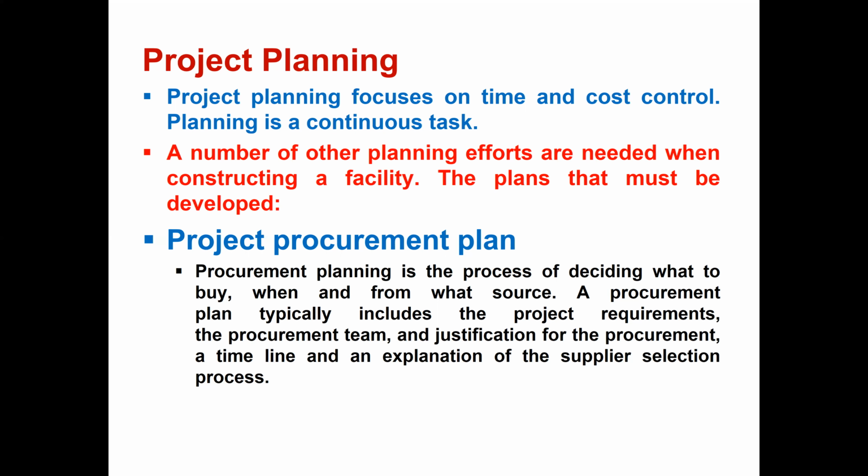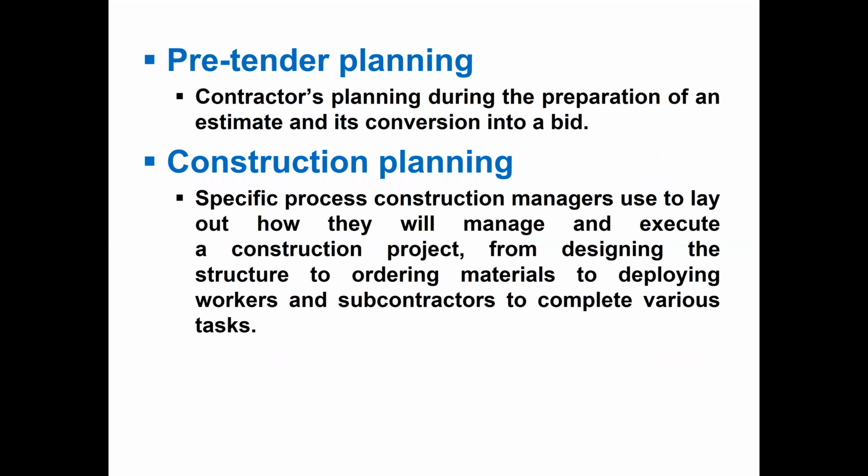All these, we have to make arrangements from where to buy those materials. So it includes procurement of material, procurement of subcontractors, or anything related to the project. In the market there could be 1,000 shops just to buy steel, but you need to fix who will supply us the cement, who will supply us the steel reinforcement. So we should make an agreement, a contract with him, so that that company can supply those materials to us whenever we need those materials on our project.